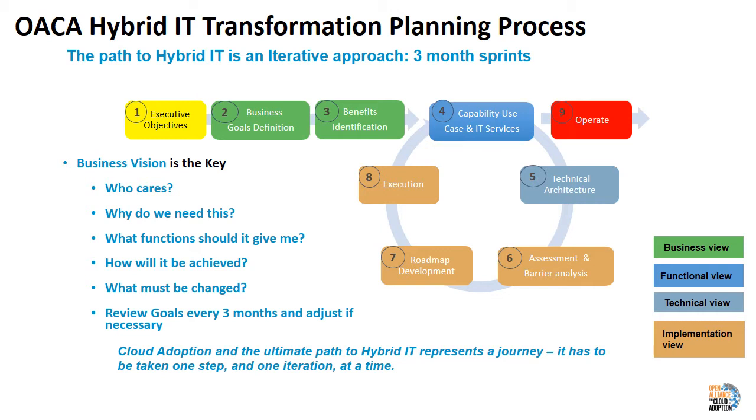The OACA recommends the implementation of agile software development techniques in the development of an IT strategy. We recommend the implementation of an iterative approach based on implementing 3-month sprints. The 4 views that we mentioned in the previous slides are still developed, but the functions that are implemented in 3-month sprints. This drawing illustrates this concept.